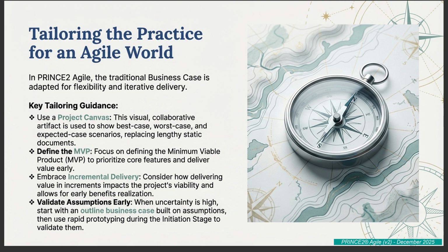Now, this idea of a discovery phase or a sprint zero, that's a bit of a hot topic in the Agile community, isn't it? It is. The guidance is clear that there's no formal standard. Some people love them for de-risking, others worry they just become mini waterfall projects up front. But regardless of what you call it, the sources are clear that some upfront work is non-negotiable. Absolutely. You need that initial phase to define the vision, to lay some architectural groundwork, and to create that initial project canvas. You need it to get formal authorization to even begin delivery. You can't just dive in without having that initial why signed off.